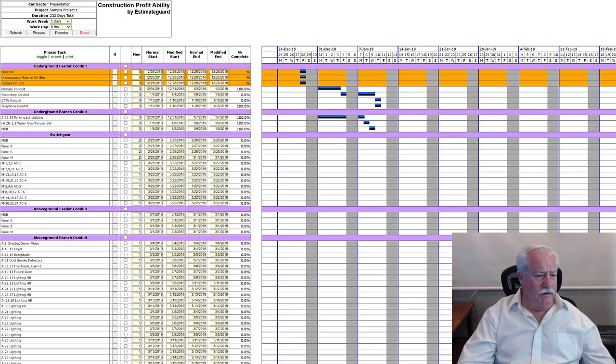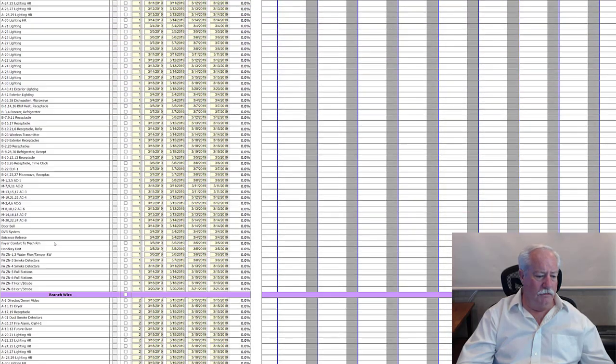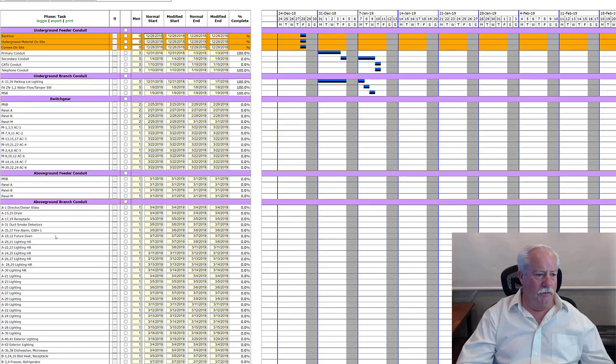Okay, so I would like you to go through these other phases of construction. On this underground branch, for example, maybe you just want to use a trencher there since it's smaller conduit. You may need to order some rebar cages for your light bollards, right? Maybe an auger to punch the holes for the backhoe. Just whatever you think you might need. Let's get some action items listed for all of these phases of construction right here, and then we'll be ready to take the next step.